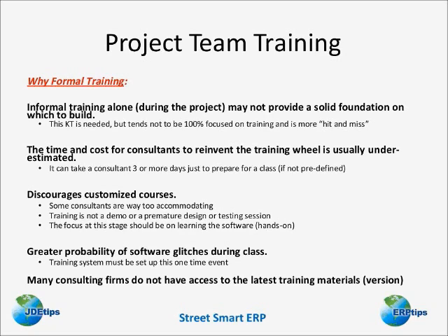The biggest issue is this: never underestimate the time and cost for an application consultant to put together a custom class for a client. I've done it before. It takes at least 3 or 4 days to develop materials, configure the system to meet the requirements of the training, loading data to support all the training scripts, and that's even before you actually do the class.